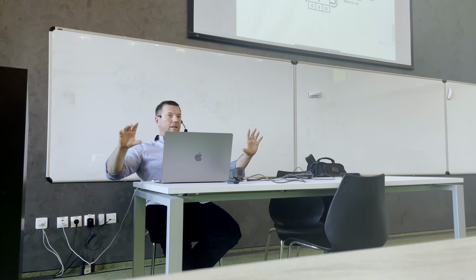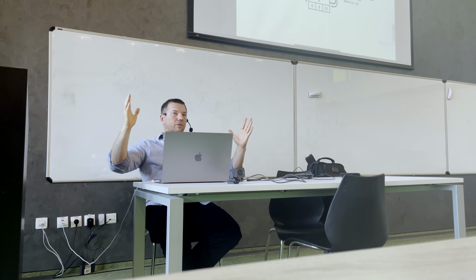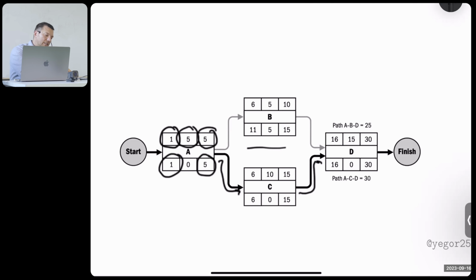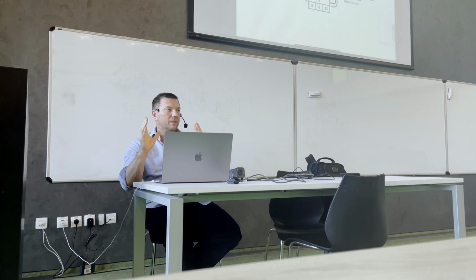If you put all activities on the diagram, you will see that some of them are on a path which you cannot move. On this critical path, they go head to tail, one after another, while this activity can be moved a little bit left, a little bit right, in time.